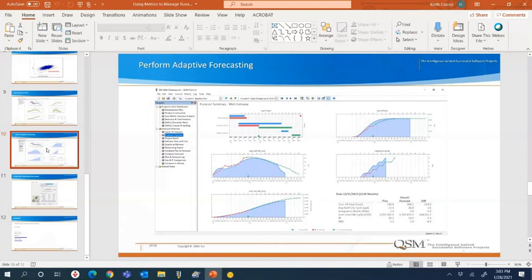And we have a lot of industry data that we use, gearing factors, so we know what the typical relations are between different size, from one sizing measure to another. So we'd want to get at how many steps it took to create that story point. And then we'd want to factor that in with the time and the effort to deliver the overall program, so our productivity index would be impacted as well.